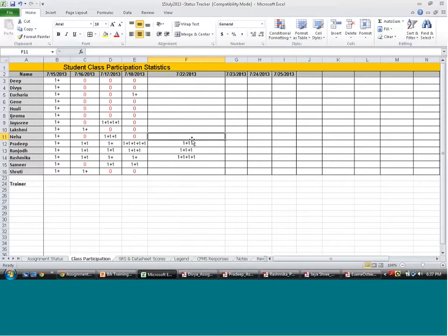Whenever there are two contradicting requirements, the first thing that you as a business analyst should do is evaluate to see if any of those statements are causing scope creep, or if any of those statements are part of scope. So you have to perform scope verification. Then you can conduct your resolution from there onwards. Talking, discussing, all of that are part of it. But the key here is scope verification.